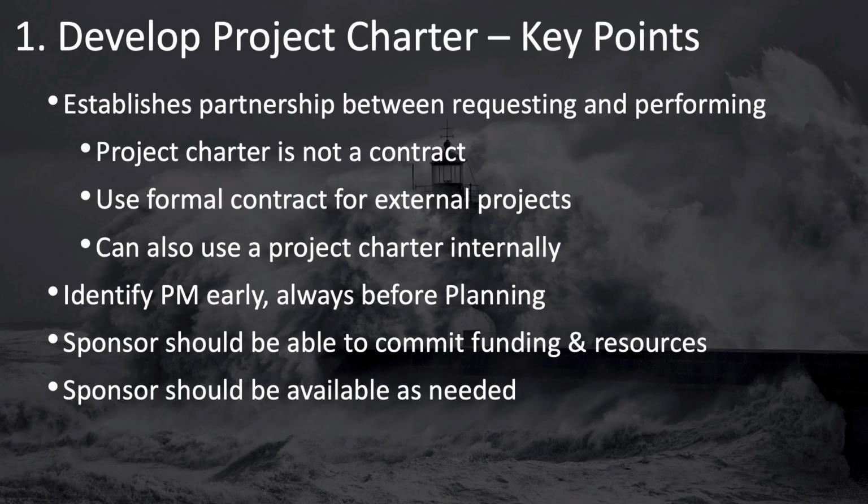However, if you have been hired to do a project for someone, then you can still use a project charter internally within your organization to help provide clarity and consistency in what is required and to help your team be more coordinated. It's also important to identify the project manager as early as possible, preferably during the Develop Project Charter process,